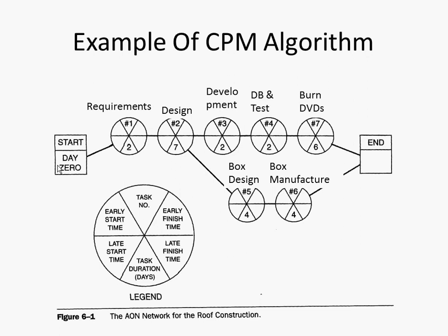So what's the earliest this guy can start? 9, earliest he can finish. 13, earliest this guy could start. 13, and then 17. You'll notice when you're going down straight line paths, it's really easy. You just copy the last one. As long as there's no join points when they come together, it makes it really easy.